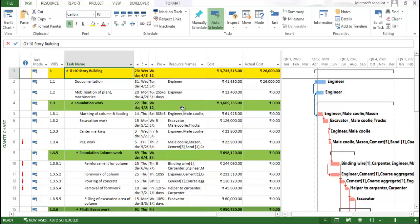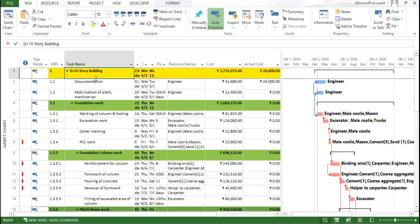Now let's go to the baseline. In MS Project, you can assign only 11 baselines. In Primavera, you can generate unlimited baselines, but in MSP there are only limited baselines.